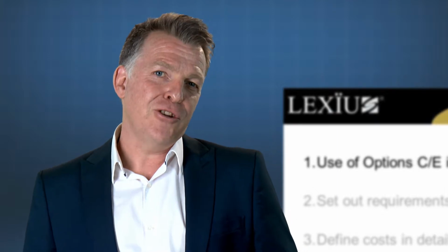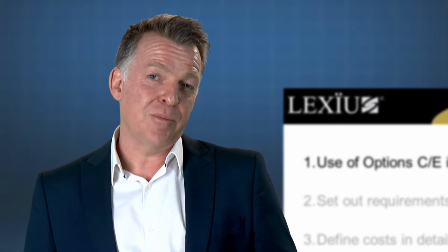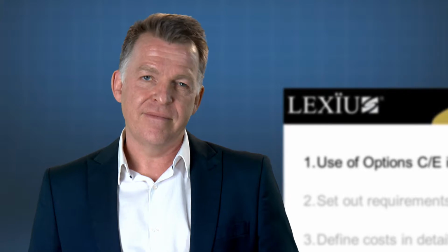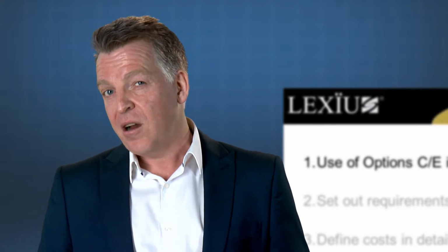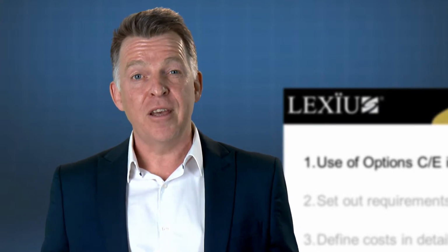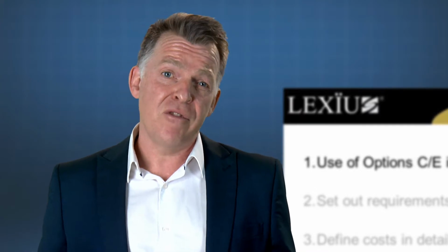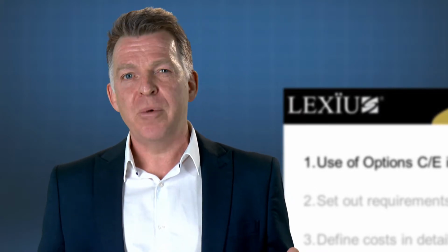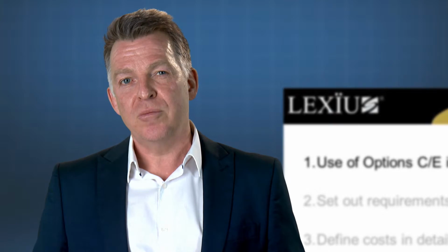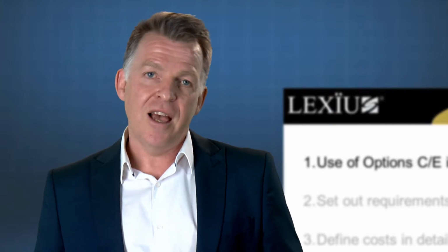So then, how can you be certain if the cost claimed has been properly incurred or not? Before you start a project, are you clear whether you are going to pay for things like private mileage, director bonuses, magazine subscriptions, professional fees, entertaining or training? And there are many more.